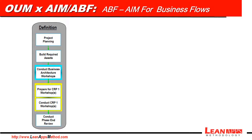ABF methodology presents five phases, just like OUM. The first one is Definition, which has precisely the same objective as OUM. We basically plan the project, build the required assets, and conduct CRP1, whose objective is to map the future process model, perform the gap analysis, and define the application setups.